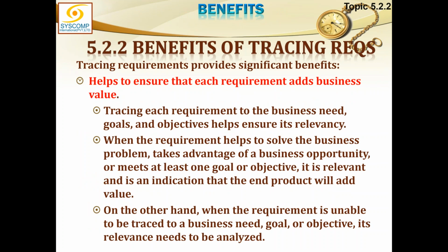Traceability of requirements provides significant benefits. So we are talking about the benefits of tracing requirements. First of all, it helps to ensure that each requirement adds business value. Very important point. Every requirement should be adding to the business value. Tracing each requirement to the business need, goals, and objectives helps ensure its relevancy.